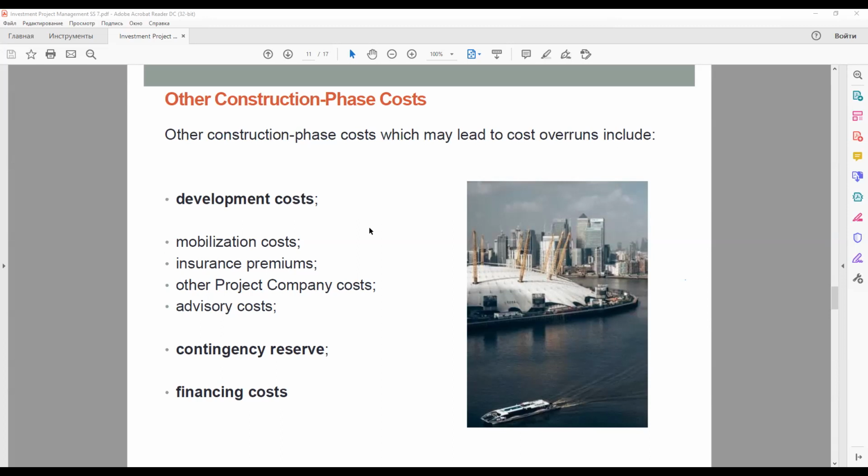Project development costs are those incurred by a sponsor before financial close. So it might seem that there cannot be an overrun on this cost during the construction phase. However, there is often a time gap between when the construction budget is agreed with lenders and financial close. And during that time, there is a risk that legal or similar costs may mount up more than budgeted.